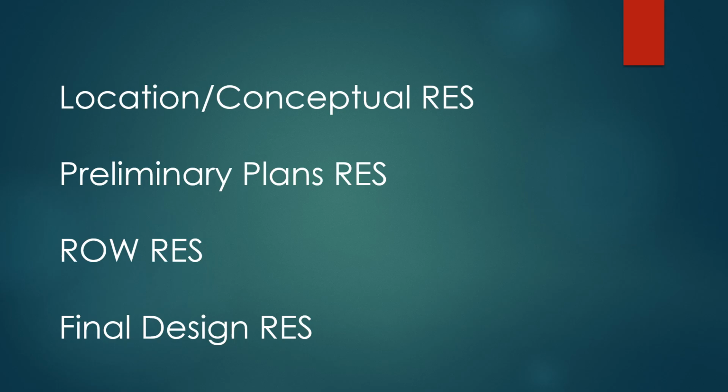The right-of-way stage RES is only required if there are new right-of-way or easements. This milestone is necessary to provide NEPA approval to request an A-date. Submit the final design RES no later than 60 days prior to PS&E. This allows for any last-minute clearances before permits are due by PS&E. Remember, if there is right-of-way, enter a desired A-date to provide a target clearance date. More process specifics can be found in EPG 127.1.